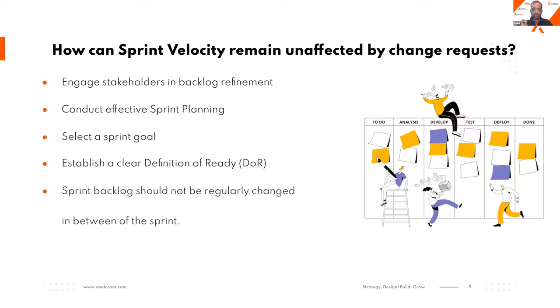The sprint backlog should never be changed regularly, but nothing is perfect in this world. If something comes to us urgently, we cannot deny the client, but let's not make a habit of it. We can take it up, but we have to discuss how we can avoid that in future. Don't take it as a normal procedure that the sprint backlog is changed every time. Whenever it happens, work with the client and establish clear change request control practices.